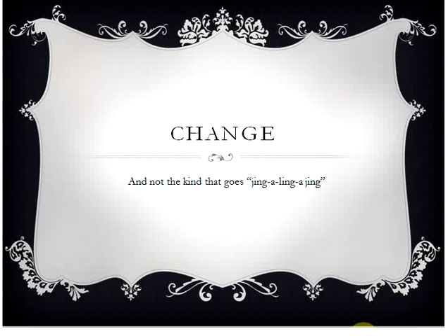They can retest it. If it passes, they'll indicate it by putting a P in the column and coloring the row green. If it fails again, they'll turn the row pink to red and put an F in it. And this kind of communication goes back and forth so that we can all use that document to understand what the change is and document what the change was or what the fix was or resolution.